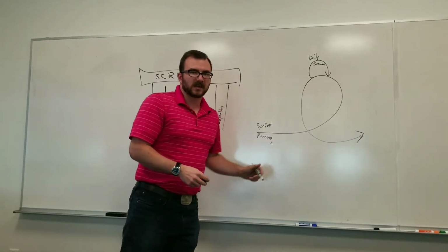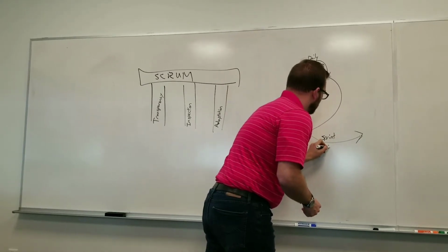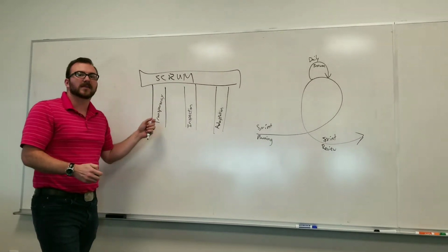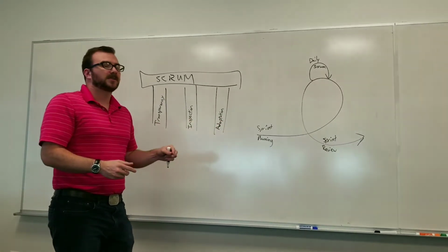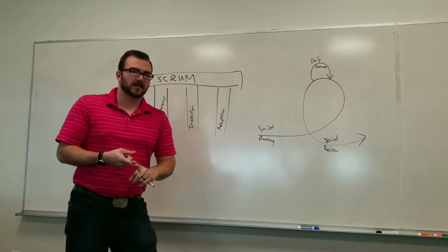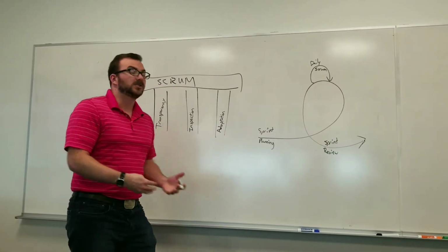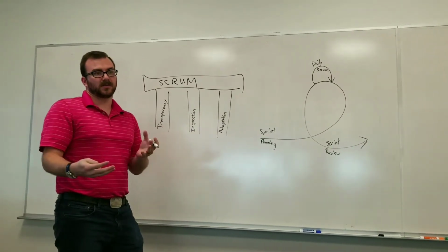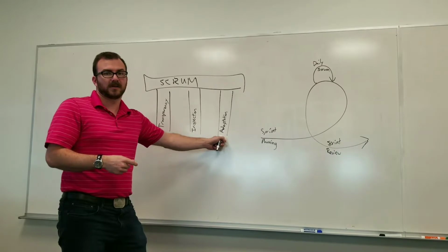As we come towards the end of our sprint, we have our sprint review. With our sprint review, that gives us an opportunity to be more transparent with our stakeholders. Stakeholders and users are invited to the sprint review. We get the opportunity to inspect 2 different things here. First, we get to inspect our sprint itself. This is what we did, this is what we were planning on doing, here was the goal. We do the demo, so that our stakeholders and users can see what got accomplished, what's going to be delivered, and they can provide feedback, so that we can adapt.